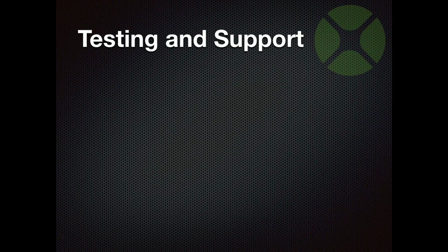Testing and support. All right, so this is all a part of perhaps your original project and then also your next project. So at the end of testing is where you kind of want to turn off the project and turn it into support. Long-term agreement with them to, maybe you fix bugs for free, maybe you install updates. There could be all sorts of arrangements that you make in a support agreement for a fixed amount that they pay you. Or maybe they just do a bank of hours that you work against. But you want to get to that support.